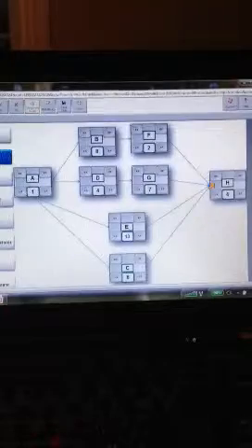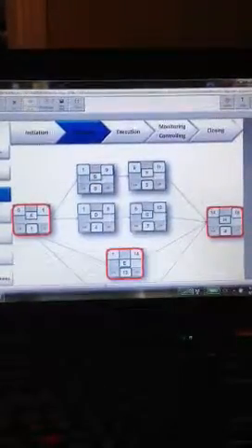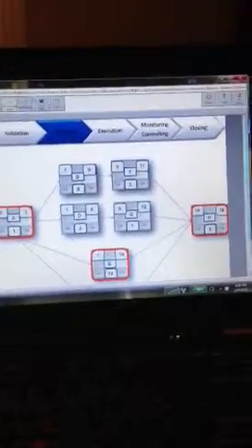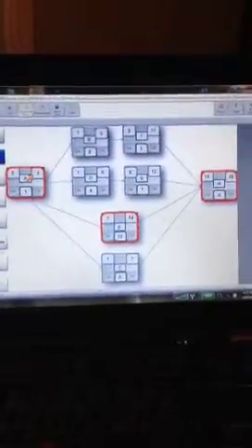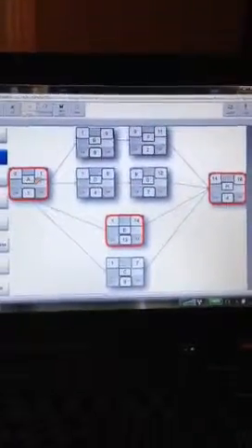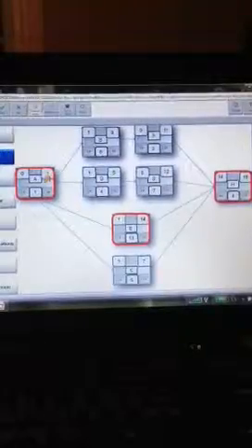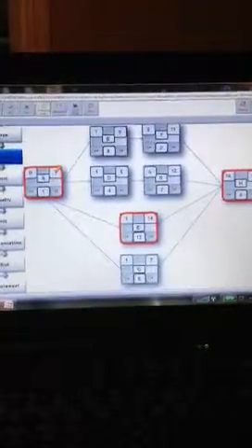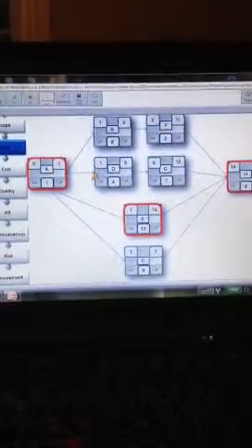All right, with that being said, keep that in mind. We'll go through and I'll just show you the answer, and how I got the answer. Start with 0. This is the earliest that you can start, plus the duration of 1. That means the earliest you can finish activity A is 1, because it takes 1 month. Now, the best bet is to do the individual paths like you've written them down on the paper. Only focus on A, B, F, and H, or A, D, G, and H.